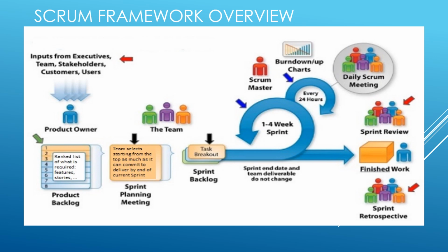The output from the sprint planning meeting will be a sprint backlog. The sprint backlog is composed of the sprint goal, the set of product backlog items selected for the sprint, and an actionable plan to deliver them. With the sprint backlog, the team then starts implementing the items.